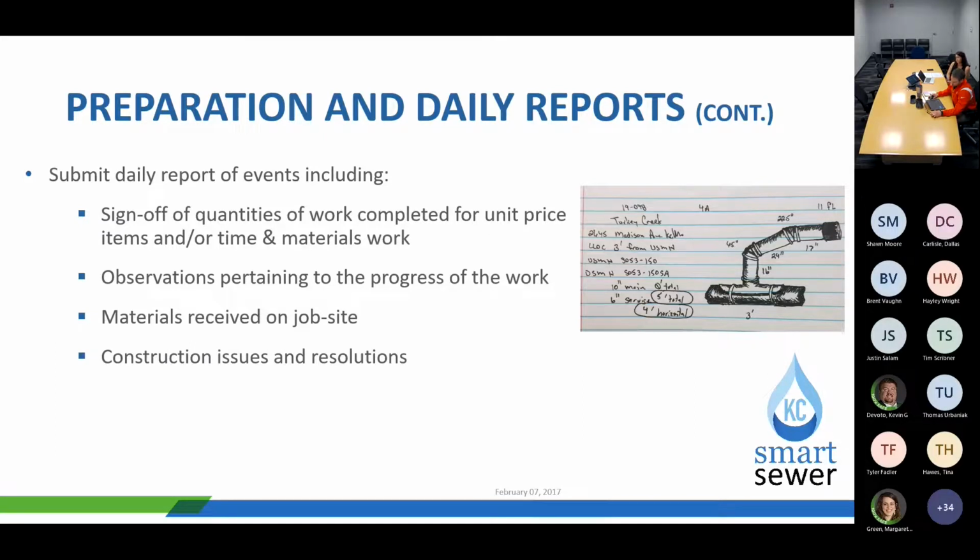And for any type of lump sum job as well, those are another type of project that would need a sign off for the SOV monthly, where you would need to keep track of the schedule of values and how much they've used and where it is, so you can go back to it and know exactly, so you can process your schedule of values.